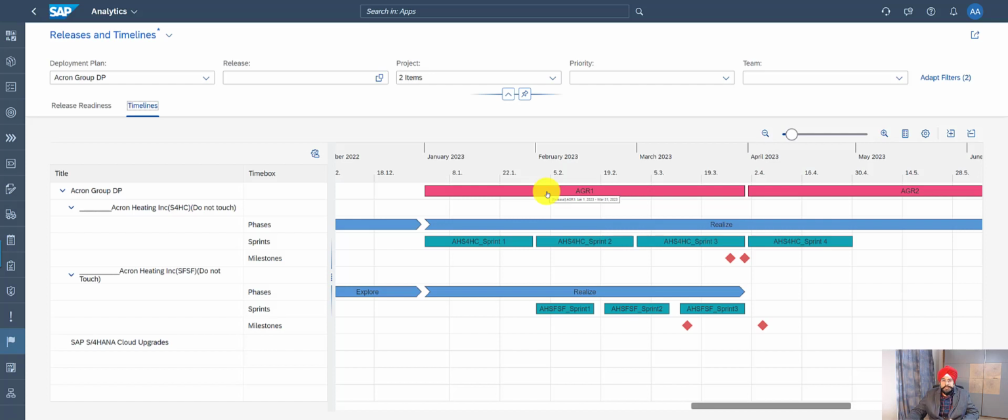You don't want to explode the number of projects, but you want to keep the timelines of each individual rollout different, because you want to assign features to a specific multi-country rollout. In that case, you can model the multi-country rollouts as releases, and that way you can assign features to those releases and manage your deployments even within a single project. So yes, it can still be relevant and interesting to you.